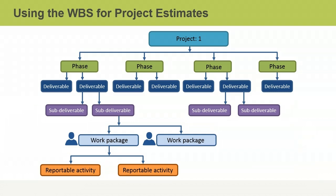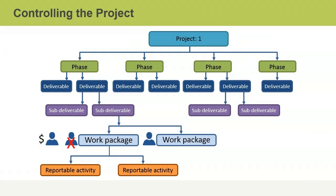The WBS also helps with scheduling — when using the WBS to create the schedule, you know for sure that you've included all the work needed to complete the project. It also allows better control. For example, if a team member assigned to a work package is going to be absent for eight weeks, the project manager checks the WBS and hires another team member to avoid delays. By running this change in cost up through the WBS, he can see the impact on the project as a whole and quickly take steps to deal with problems.